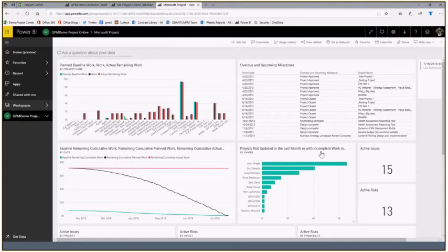That's a good thing to understand. If people are not updating the projects properly, you're going to get bad data in your system. You're not going to have what you need for it to be appropriately active. So these are just various ways to create different kinds of indicators to help you manage what's going on. And you can see some of these become eye charts. Probably not a great way to look at things, so you may want to do some filtering. You may want to have some other ways in here to get to that data so that you're not doing that sort of thing.